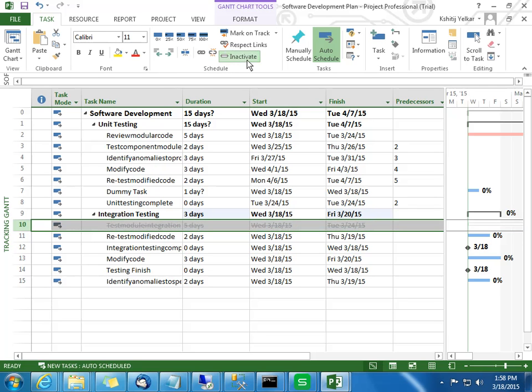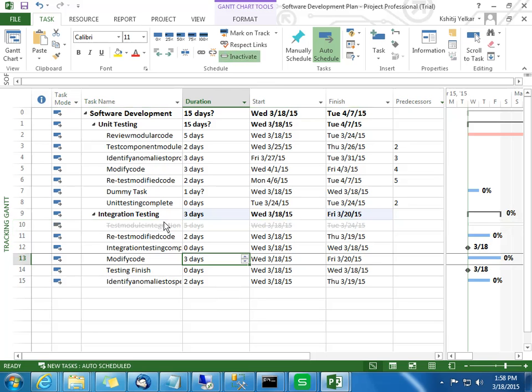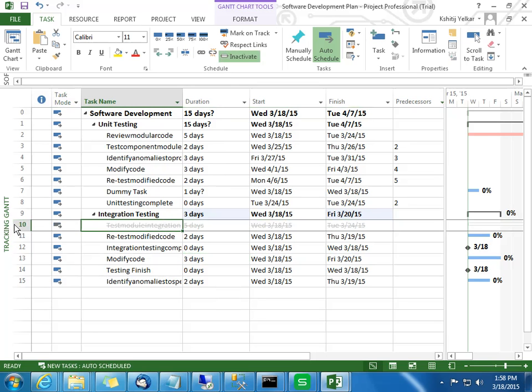See, it can become 3 days, because when I say inactive it means it will be removed from the schedule. So normally people don't want to delete the particular task, we have to put the task on suspend mode. It may open in future, but I don't want to delete it, I'm just making it inactive, like we do strike through. Okay, so it's sort of this.